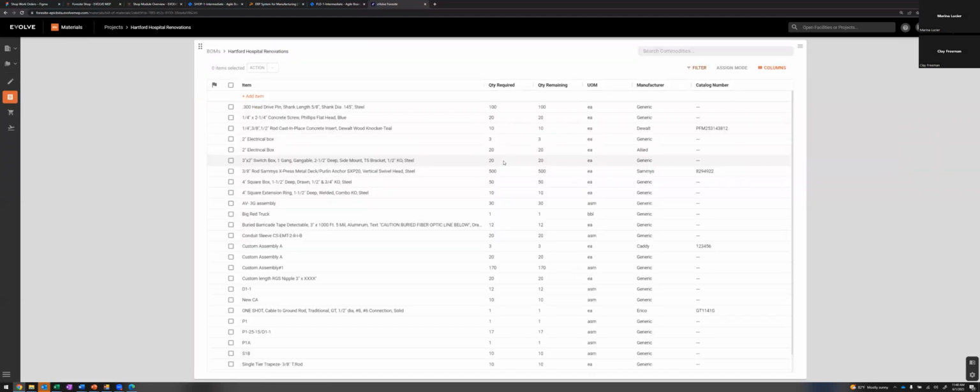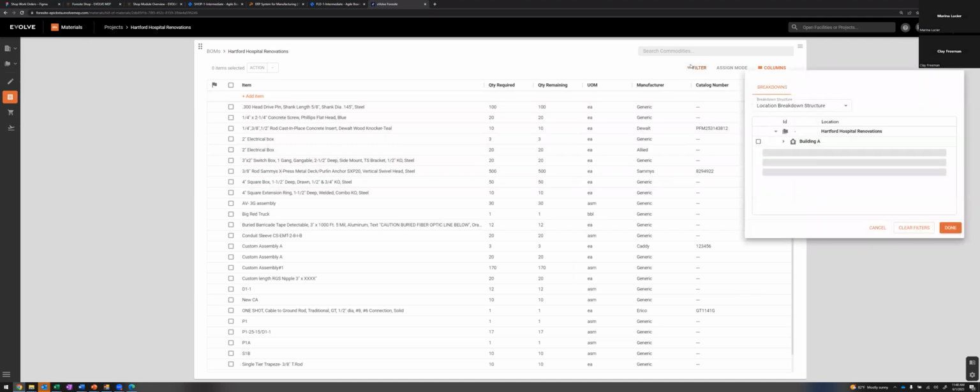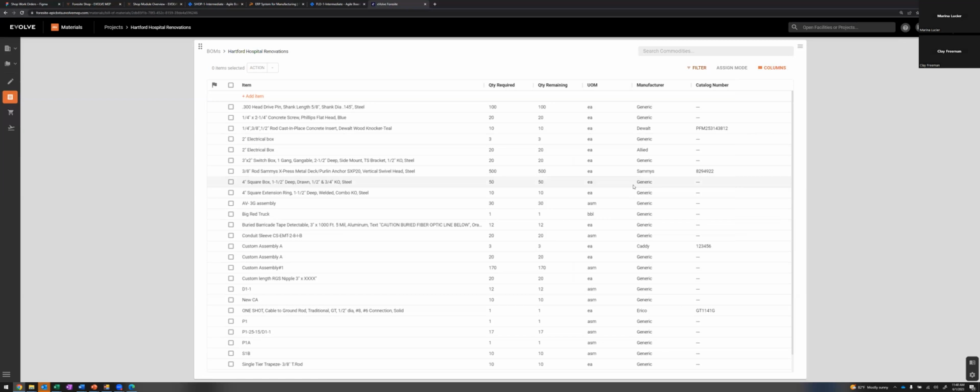But I talked earlier about how we can take these items. You don't have to filter it by location, but we think, of course, you would. Most planning is done by location. A lot of the detail planning is done on some kind of look ahead cadence. You would filter for your location and your work phase. And the assignment is going to be either to a work request or to a requisition, regardless of whether you're fabricating the items or you're buying it from a supplier. We'll be able to track it here.